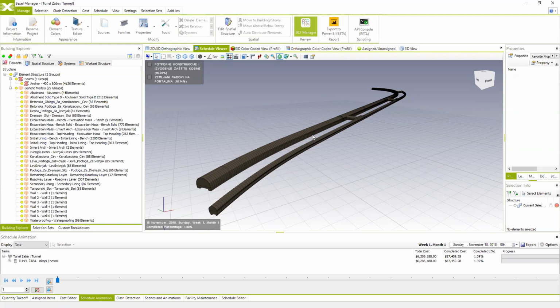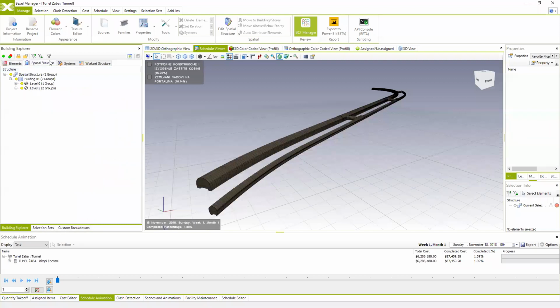I wanted to mention in today's webinar how you can manage these kinds of zones which are not related to buildings or levels, with automatically provided segregation. Instead, you can use selection sets or any different kind of grouping of your elements based on the properties.